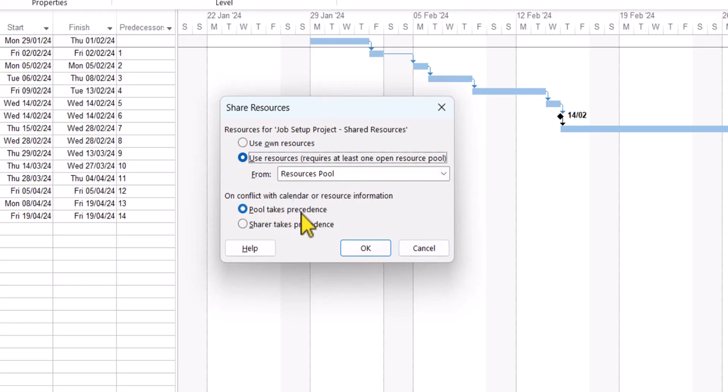Where it says 'Pool Takes Precedence' — this is really important. If there are lots of projects sharing resources from the resource pool, the pool then makes the decisions of who can have resources and who can't across multiple projects. So this is really useful to have on this setting. I'm now going to click OK.